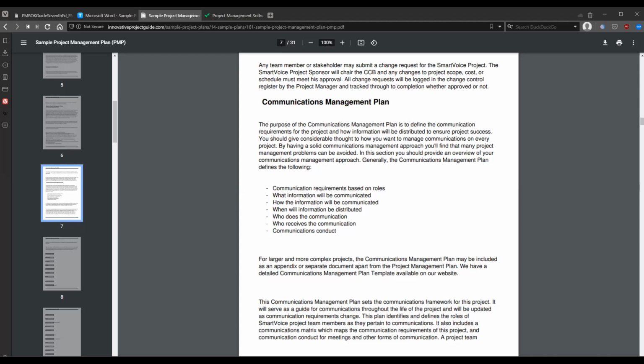I mean, some people use Excel just to track tasks, but that requires a lot more effort because you cannot set up Excel to remind you when next task is due. You have to manually review it. So using something like Outlook, or more specifically specialized tools like Rike, helps a lot more. These tools provide reminders, they keep track of dependencies, they keep track of team members that are executing certain tasks, because project team might be quite sizable, have a lot of people involved.